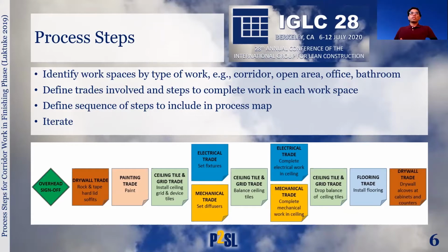In relationship to the production system design, we asked the team several questions which help us define these processes. Questions included: in what units will the work be assigned to the group of workers, how will the work be sequenced, and how will work be released from one group of workers to the next. Will the consecutive group of workers execute work in a continuous flow process, or will their work be decoupled? Several questions like these help us create these process maps.